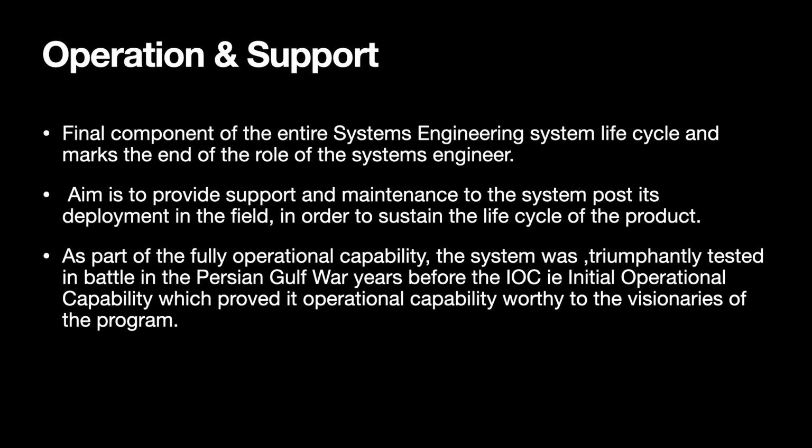The JPO, which was instrumental in the development of the GPS, was able to successfully establish themselves as system integrators and controllers of the functional baseline. Furthermore, with the assistance of the Aerospace Corporation, JPO was able to conduct required system trade studies in order to optimize the functional baseline, from which increased requirements were identified, resulting in changes in future budgets.